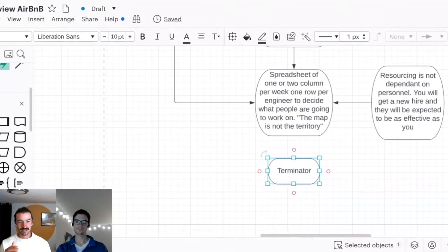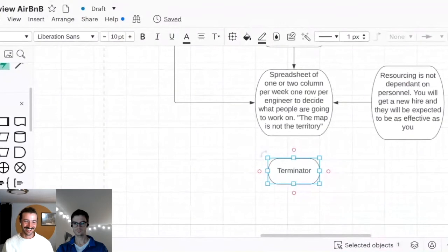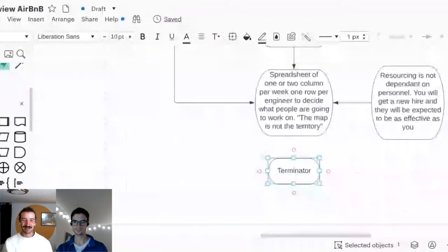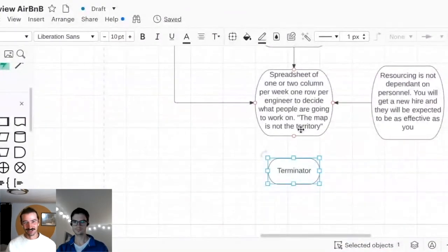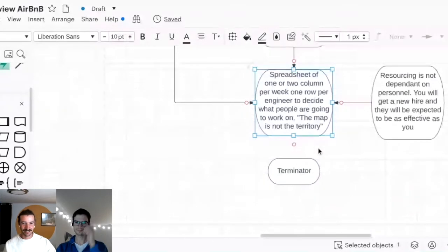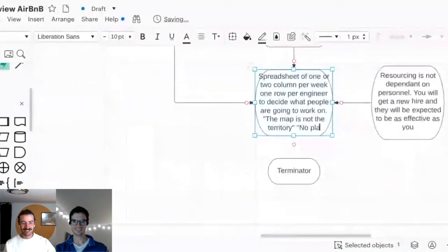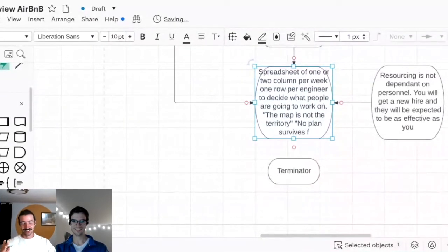So you need some kind of deadlines. You need to put things in dates. And then you also, this is the hard part, need to look at that and say, hey, there's absolutely no way that this is accurate whatsoever. Or, you hope it is, but you recognize, what do they say? No battle plan survives contact with the enemy. Things will not go your way. Maybe some things will go faster, but just by virtue of the fact that a 2-week project can only finish 2 weeks early, but it can finish a lot more than 2 weeks late.